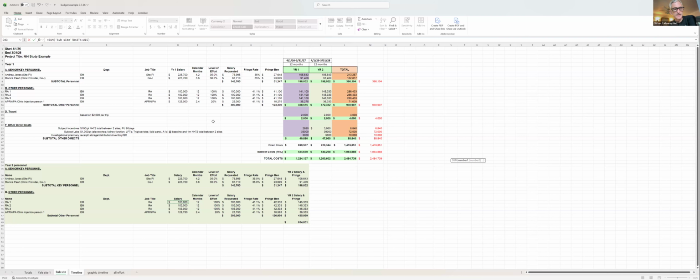I would also add that once you get funding, there are lots of fees that you didn't know about. The IRB will have a fee, the pharmacy will have a fee, your lab core will have a fee. You kind of are protected from that when you're in training or don't have any money, but as soon as you have money, everybody wants a piece. So your budget needs to have that built in.